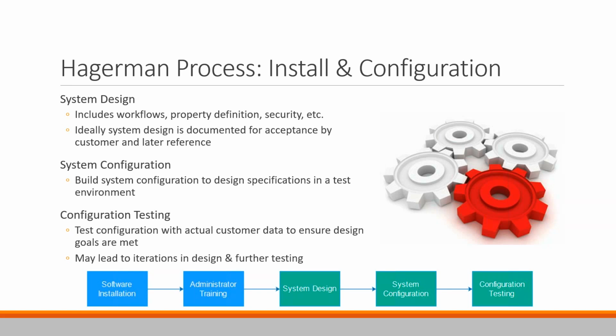For larger implementations with more complex configurations, we do our best to document that design and make sure everyone agrees for how it's going to work. That way there are no surprises later on. Then we build out that configuration and test, iterate, test again.